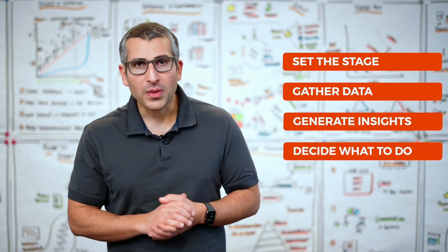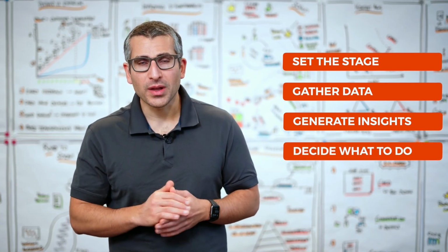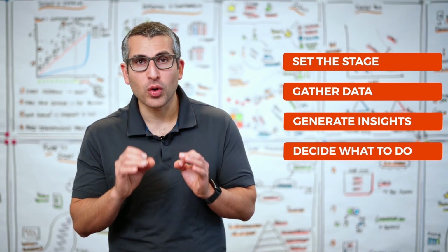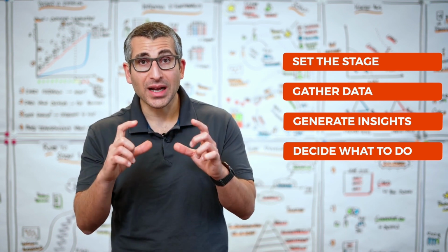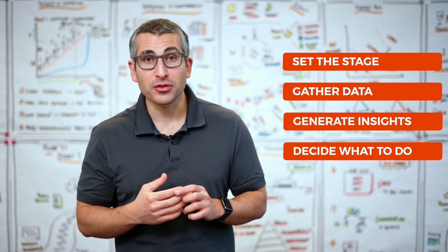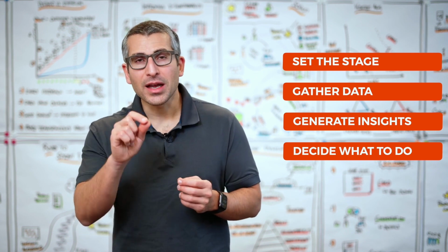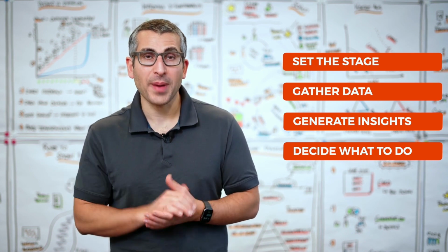Step number 3 is to generate insights. In most cases, you select 1 or 2 points that didn't work out really well in the past sprint, and you dive deeper on those. Step number 4 is deciding what to do. What do we actually want to do differently in our next sprint? Those action items, I prefer to refer to them as Kaizens, move into our next sprint backlog.